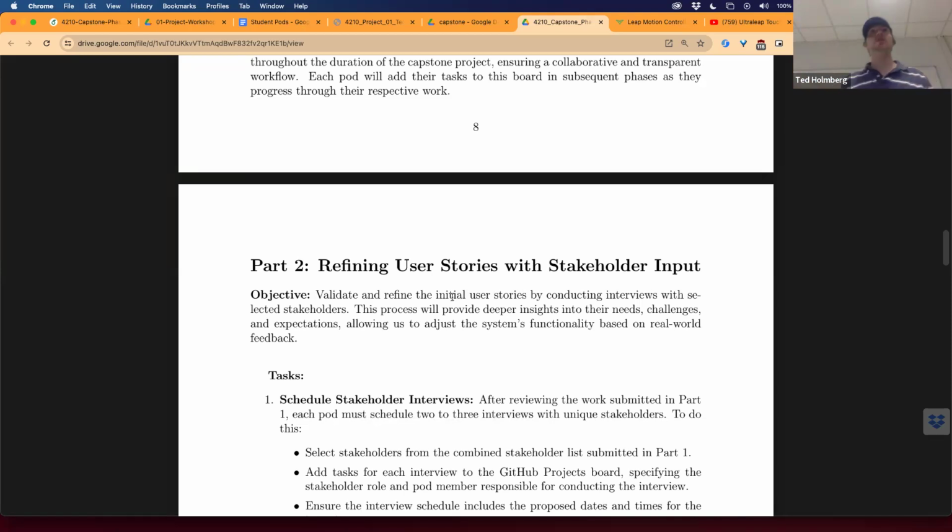So, agile. I guess the point there is the agile dev cycle doesn't mean there's no planning. It's just you're not planning from start to finish all at once. It doesn't mean you don't have a prediction of where the finish line is going to be. It's kind of like tracking a hurricane. You have your cone of uncertainty, and then as it keeps developing along, you get more and more certain about what you're actually targeting and where you're going to hit.